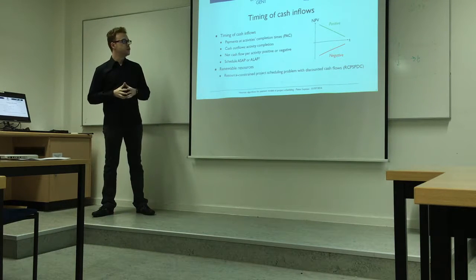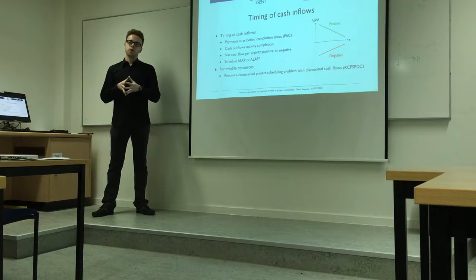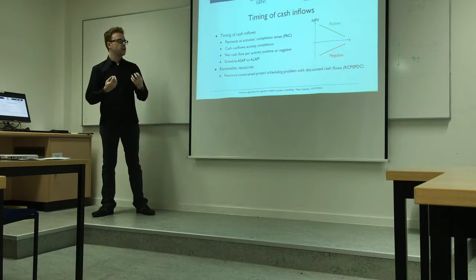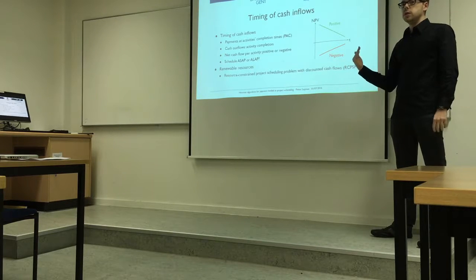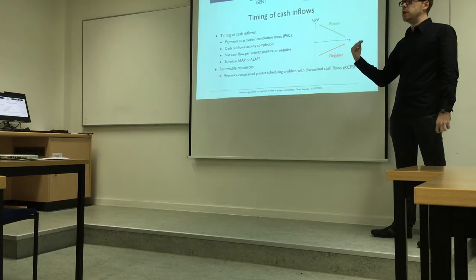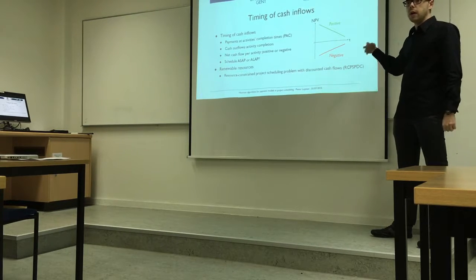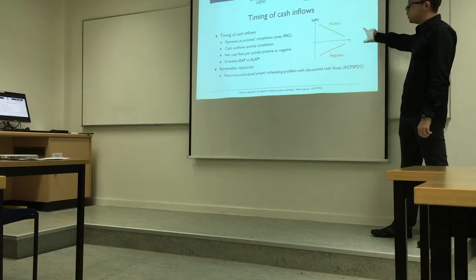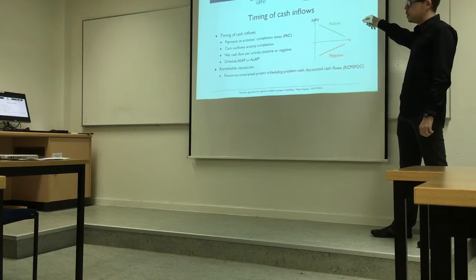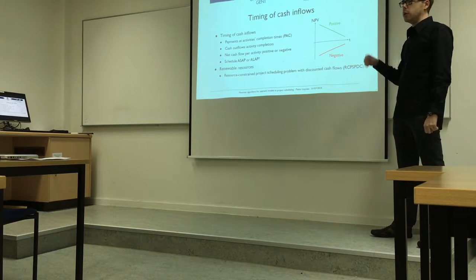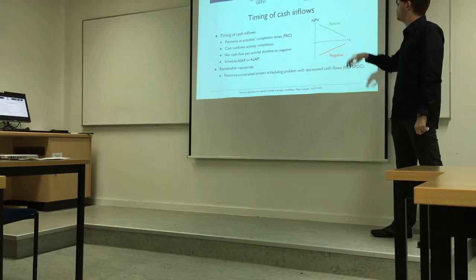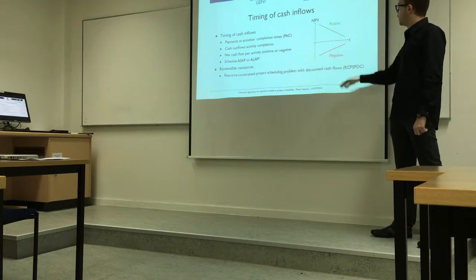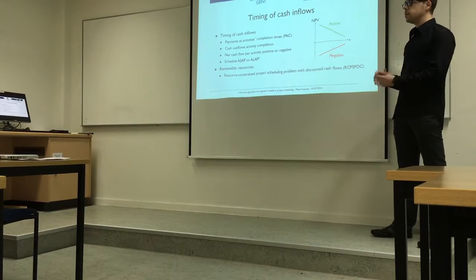The timing of cash inflows means we assume that the size of cash flows is known — each activity has either a positive or negative net cash flow — but the question is when will these flows be received or paid. For an activity with a positive cash flow, it always makes sense to schedule it as soon as possible because delaying it decreases the NPV. For an activity with a negative cash flow, the opposite applies.